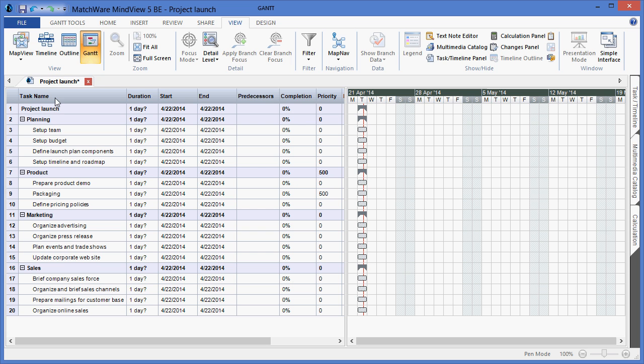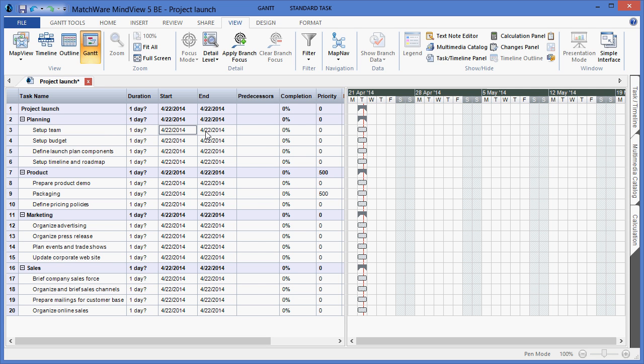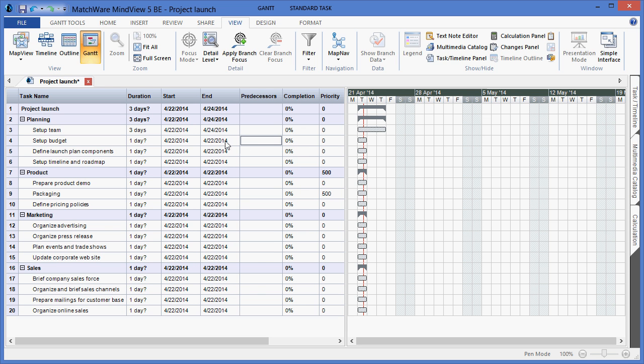To start associating task information, I can work directly in the outline view if I choose, by left-clicking in the calendar list and associating the correct start date. To increase or change the end date of a specific task, I would choose the duration column and increase or decrease the duration. I do not want to get into the habit of changing the start date and end date. I would choose one or the other and use the duration to forecast the opposite.